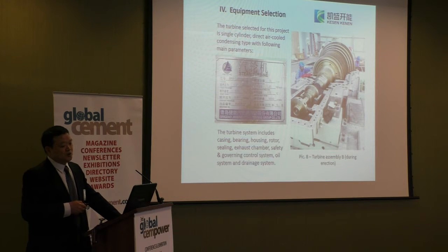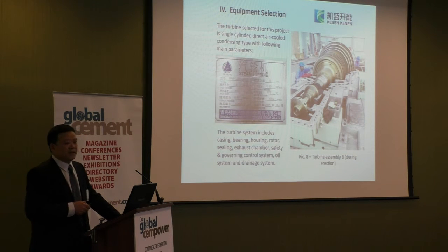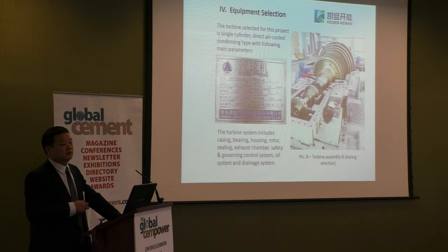During the installation of the turbine, we sent 2 experts to monitor it, because the C-portion company is not familiar with the auto assembly turbine, which is assembled on site piece by piece. So we sent 2 experts and did it all by ourselves, and also asked them to give us several workers' help.